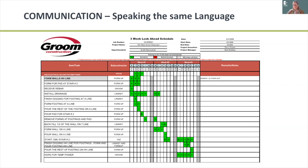And this is where the humility often comes into play, because more often than not, the detail that we thought was going to go in a certain order, we get on the call with the 4 or 5 different trades, and they start talking and they start saying, I have to go in first. We can't do it after that trade. And so then we need to rethink our detail to some extent, but we can do that together proactively before it actually gets installed, as opposed to having to remediate new construction work, which drives me bananas. Unfortunately, it definitely happens, but to the extent we can avoid that, it's really helpful.